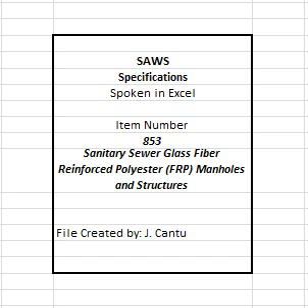foot above cone section, drop pipes, reinforced concrete, fittings, labor, tools, equipment, T's, Y's, INI barrier, and incidentals, trench protection, and disposal of material excavated, backfilling and compaction. Furnishing and placing all materials necessary to complete the work is included in milestone 2 and must be completed prior to payment, 40%.